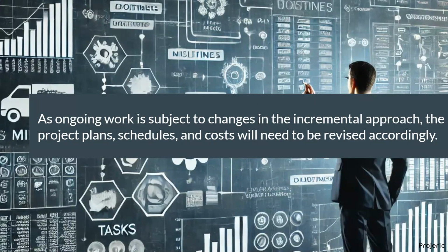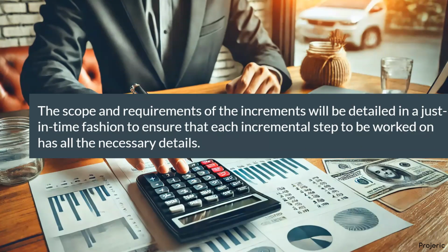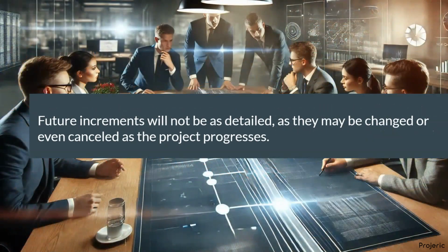As ongoing work is subject to changes in the incremental approach, the project plans, schedules, and costs will need to be revised accordingly. The scope and requirements of the increments will be detailed in a just-in-time fashion to ensure that each incremental step to be worked on has all the necessary details. Future increments will not be as detailed as they may be changed or even canceled as the project progresses.